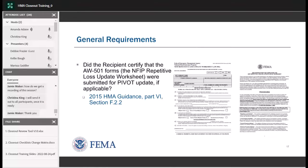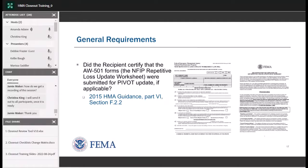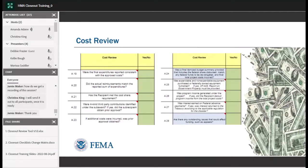We're also checking for repetitive loss and severe repetitive loss properties — properties that have had NFIP flood insurance coverage with several claims, listed in the database as repetitive loss or severe repetitive loss. We need to verify that the AW-501, also called the NFIP Repetitive Loss Update Worksheet, has been submitted to FEMA to update that specific property in our PIVOT system to show it's been mitigated. This should also reduce flood insurance rates for that property owner.